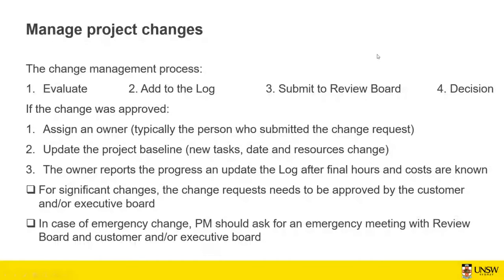Okay, but during the project, not everything goes as planned. So sometimes you need to make some changes, which we discussed. That's the change management process, where you evaluate the change, add it to the log, and submit it to the review board, and they discuss it in order to approve or reject that change. After that, you make a decision. If the change was approved, then you assign an owner. Every change and every risk has an owner. Typically the person who submitted the change request is the owner of that change.